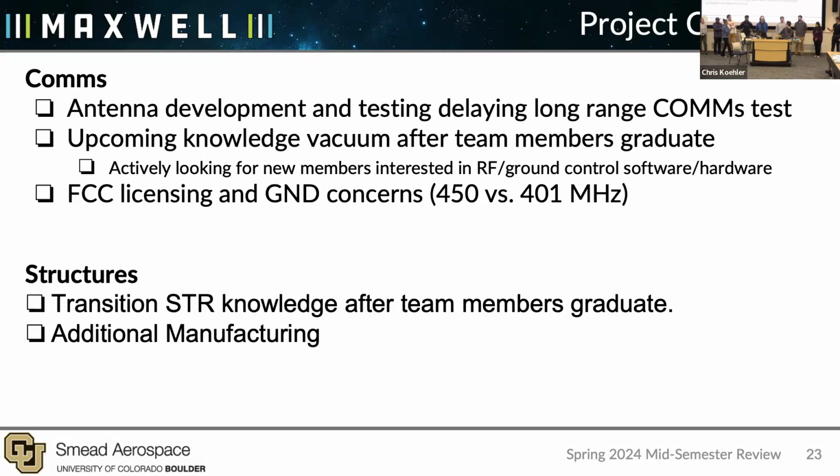So I will pass to comms. On the technical side for comms, we are at the point in our testing where we're going to move into longer range testing and integrate our antenna, but we're not quite at that point with our antenna development and testing. So that's going to become an obstacle. We're going to be allocating some more resources to that effort in the next couple of weeks.